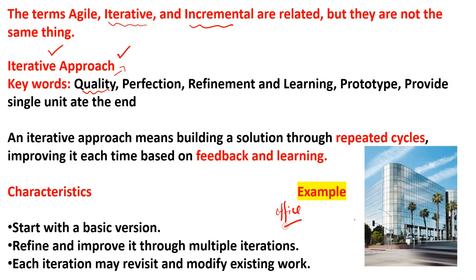So when you complete the first floor, you have to show it to your customer or a stakeholder, you will get feedback, and again you have to work on it according to your feedback. You have to refine the first floor until the customers or the stakeholders are satisfied. Then you have to move to the second floor, same thing. You have to start with the basic version, and then you have to get feedback from the stakeholder or customer. You will learn, and then you have to refine.